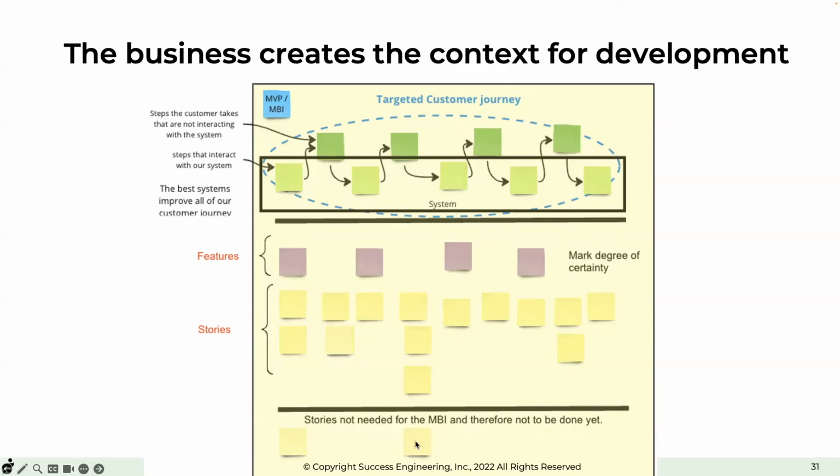This is the other cool thing about MBIs. A lot of things we're considering doing don't need to be done in the first release. By identifying this is what we're building, it's in the market of, say, non-European at the time, or non-Asian too, just US, things of that nature. When we decompose, we can determine if we need it or not. So anything we pull out and put down here is what we don't have to build yet. We'll get what we do need to build.